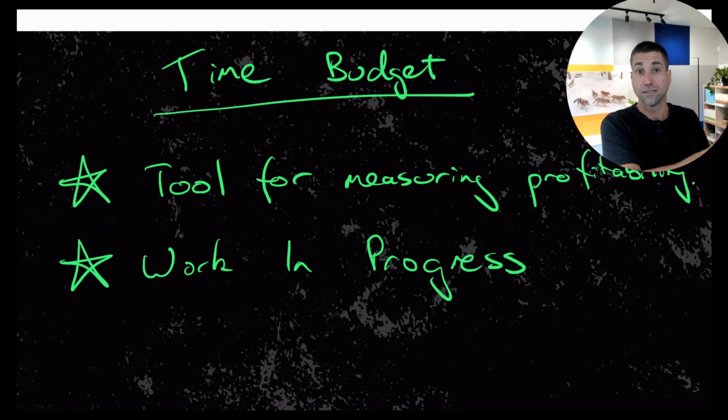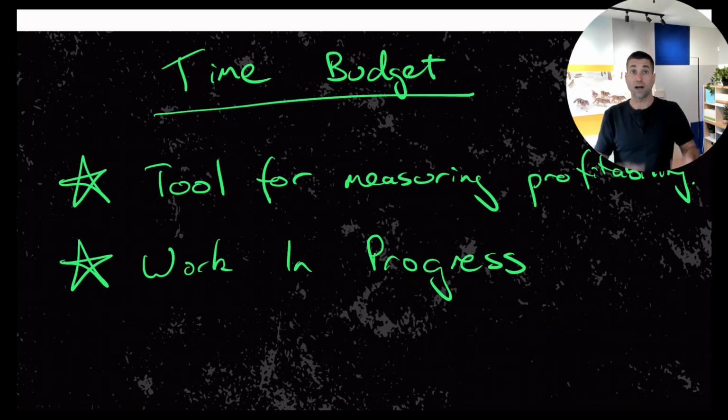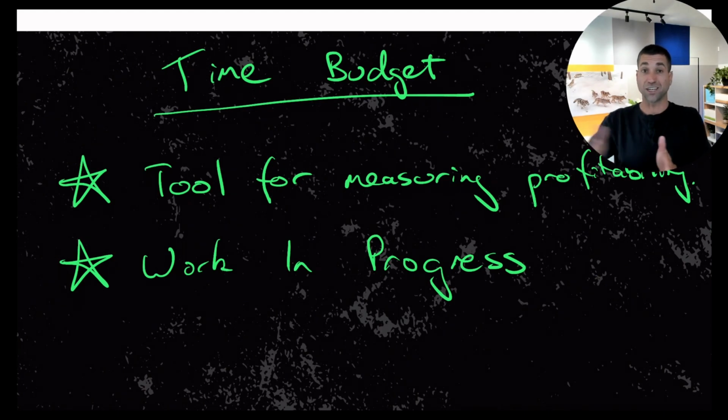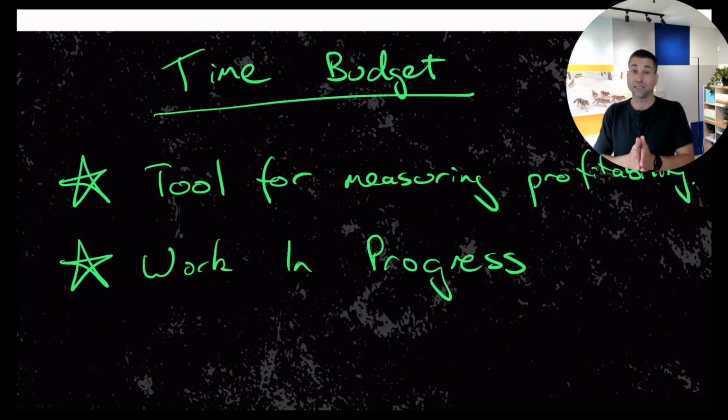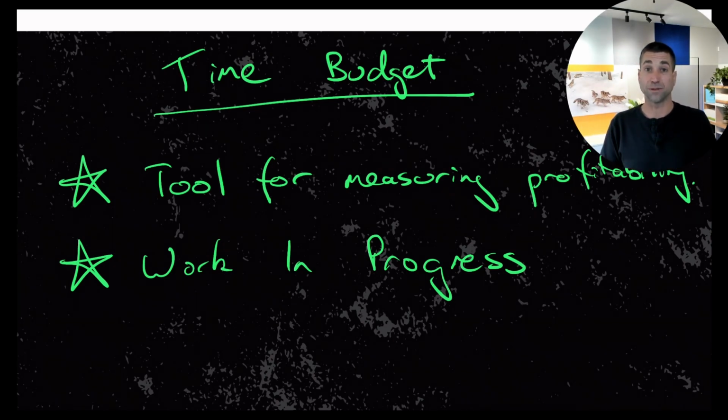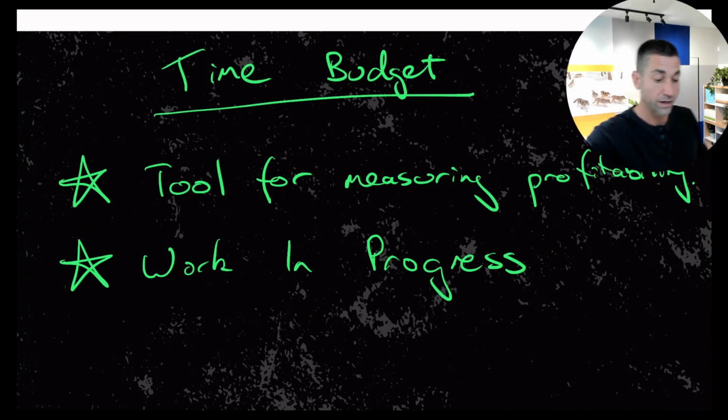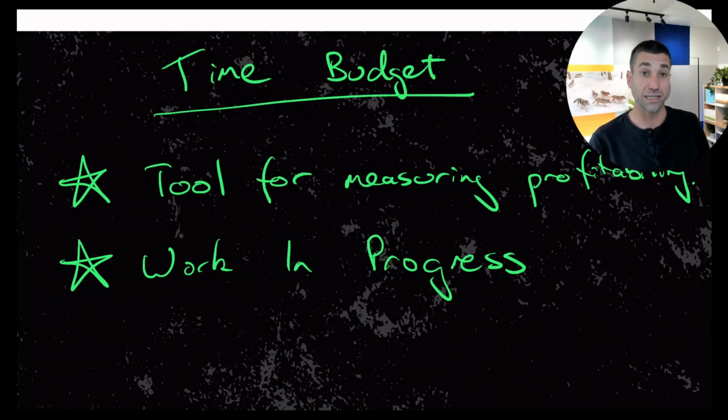It's done, right? Your work in progress gives you an up-to-date view of where things are at right now. Now, you still can't change what the work in progress has done, but your forward forecasting of where that's going to leave you, you can change. But you need to know that. So you need to do your WIP reporting to go, right, where am I across the company right now with profit and with profitability? And you need to be able to look ahead and do that. So that reporting, rather than just your P&L reporting, is a really key thing of this.